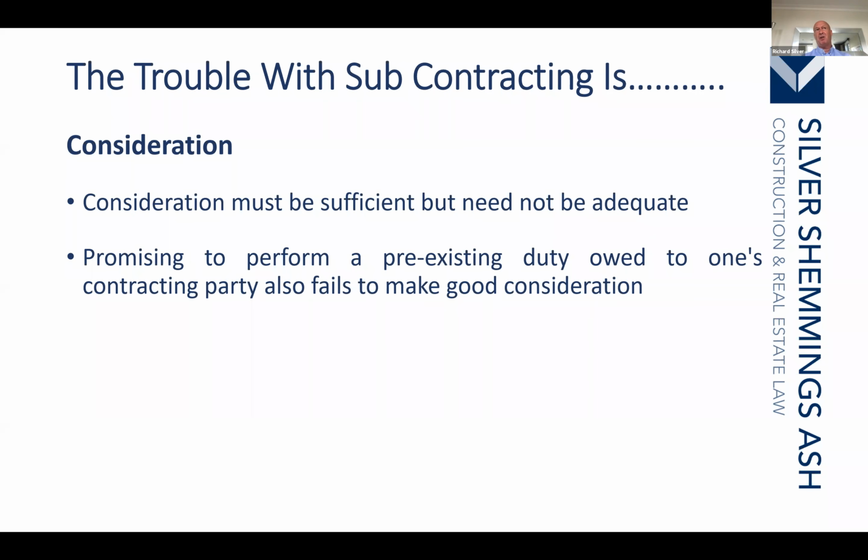And more often than not, I would suggest to you under subcontracts, they're anything but fair. Because in the majority of times, the subcontractor obtains the contract because they've underpriced it or are lower than the next best tenderer. So you can't get out of a contract because it is unfair, you've underpriced it, provided there is an agreement, an offer and acceptance and consideration, the contract is enforceable.